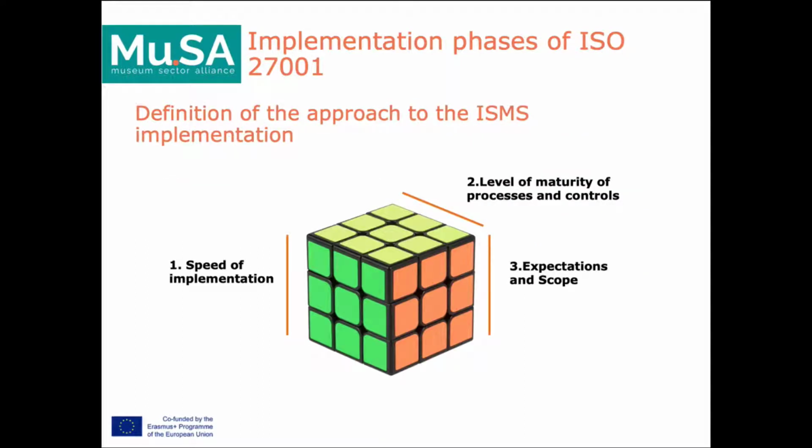An organization wishing to comply with the ISO 27001 may consider several approaches based on the speed of implementation, the scope, the maturity level targeted of the process, and the security controls. Using a rational approach, it is not unreasonable to consider a period of 6 to 12 months for the project from conception to completion of the first cycle of audits and the monitoring of the system.